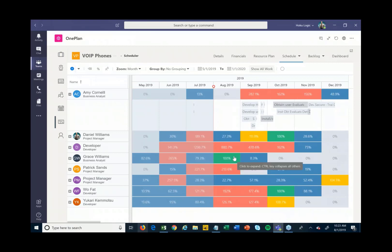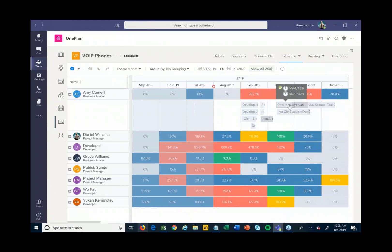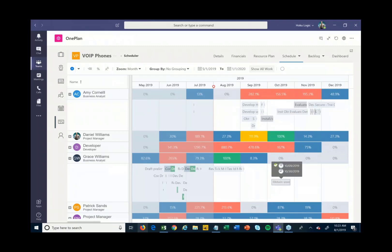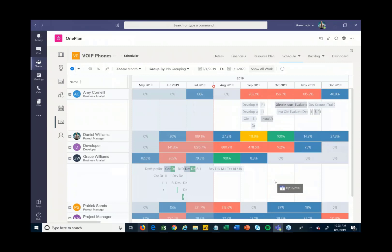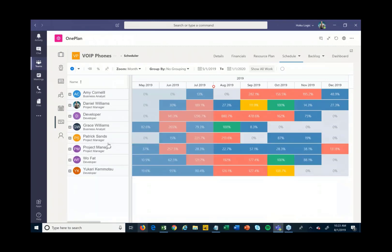You can see that certain people are over-allocated, highlighted in red. I can view that in hours or flip to a percentage view. From here I can make adjustments — for example, if Grace Williams has availability I can drag and drop a task down to Grace so she can take on that work, helping avoid resource over-allocation issues across all projects.